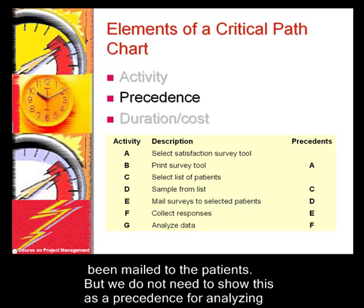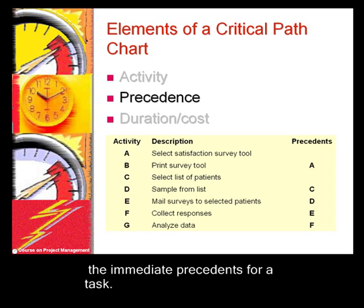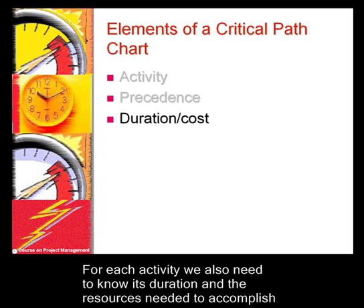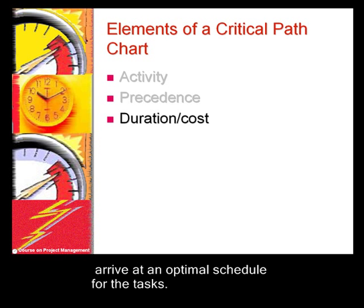The precedence structure also says that we cannot analyze the data until we have collected it. We don't need to show mailing as a precedence for analyzing the data, because it is already a precedence for collecting responses. In a precedence table, we show only the immediate precedence. For each activity, we also need to know its duration and the resources needed to accomplish it. The critical path method uses information on precedence and duration of activities to arrive at an optimal schedule.